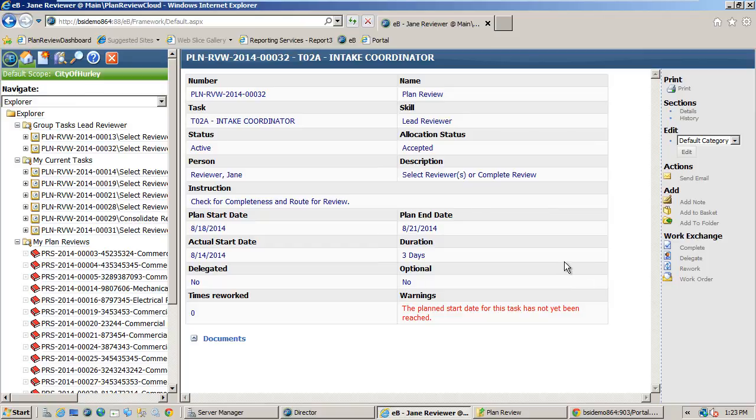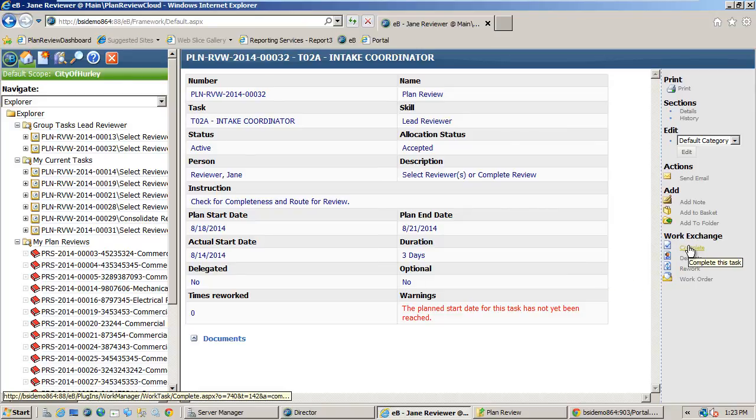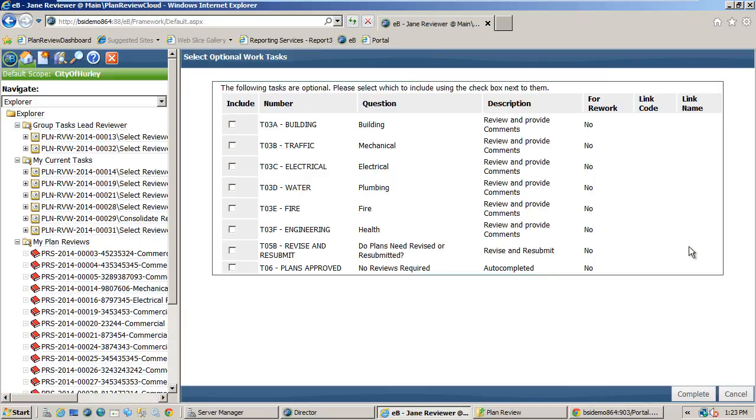Assuming the lead reviewer has completed the completeness check and everything looks good, we are going to go ahead and complete this task to move the process forward in the workflow. After completing the task we are prompted with selecting what reviews need completed for this plan set. I will select building and fire then complete.